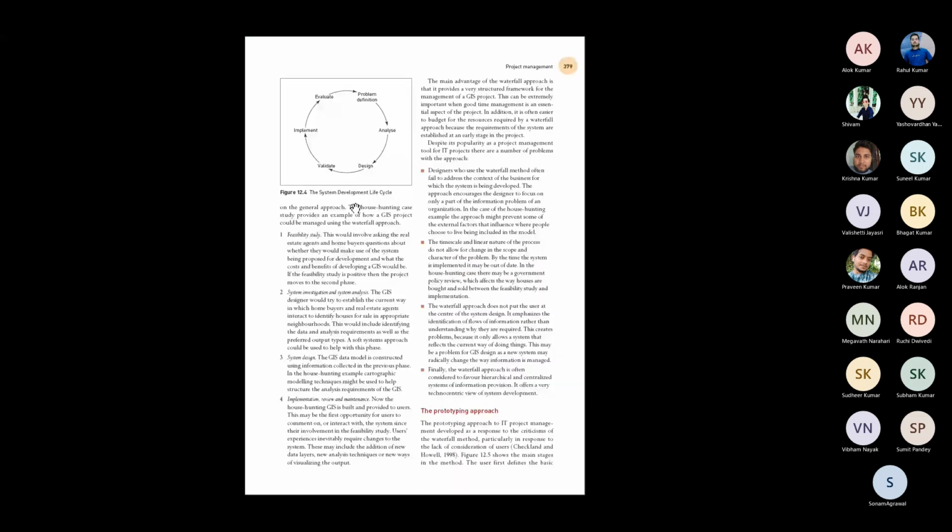The waterfall model is shown in this way. Why is it known as the waterfall model? Because just like a waterfall, it can flow only in one direction, so you cannot go back to the previous phase. It starts with the feasibility study: whether it is feasible to do that project or not. Thereafter, there will be a requirement specification. What are the requirements expected from the system? The client's requirements will get listed. For that, we have learned rich picture, root definition, and other methods are also there.